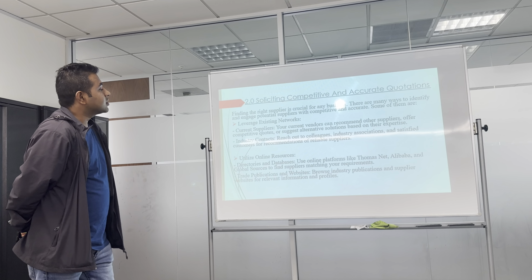For quality compliance and cost competitiveness assessments, when the estimation department gets a quotation, they look at two main things: cost and quality. The engineering department usually checks if the product or subcontractor work meets quality standards, while the estimation department focuses on the cost. Quality compliance and assessment. Compare proposed specifications to requirements. Ensure key features, materials and tolerances are met.